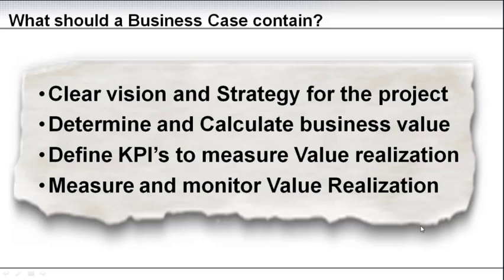If you are on track and everything is fine, your project is built to deliver this value and fulfill the business case, then you need to have the monitoring. The monitoring needs to continue after your go live, because this is where you will document to the executives if doing this project really was the right choice or the right decision. So the monitoring goes beyond the project.